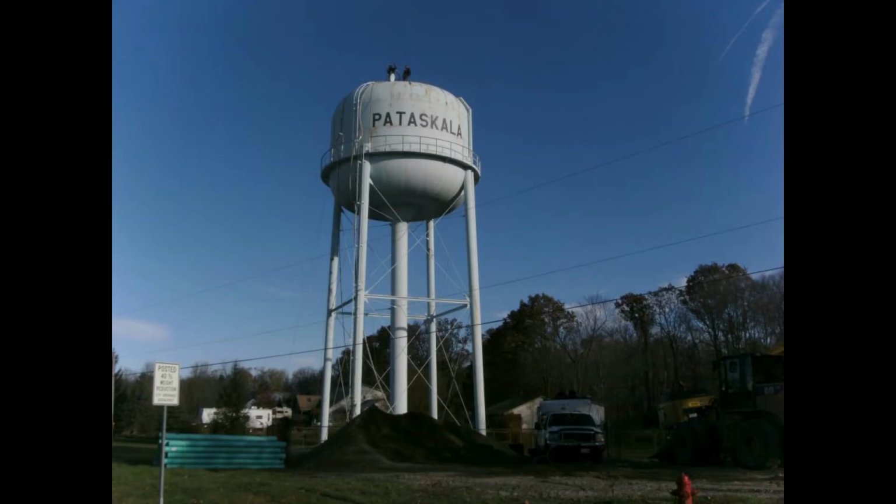Well, there's land available up there. It's not developed. Agreed. Maybe not the right word. Yes, sir. There is land up there if everything would work out. So the plus side to the purple one is that you do have a pump station and a force main, but force mains are cheap and easy to put in relatively, as opposed to that big red line. It's going to be a big sewer, and it's going to be deep to receive everything on that email. That's going to be expensive.